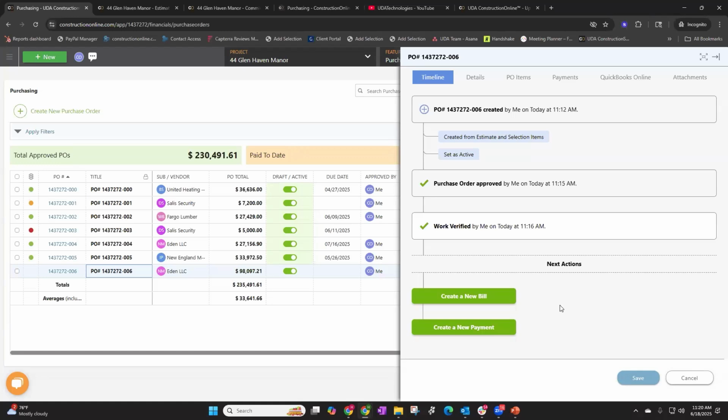When we think in the context of purchase order tracking in Construction Online, when you're submitting a purchase order, that's not necessarily the end of the story. We're also going to receive things like invoices from our subcontractors. We're going to receive bills that they need us to pay. So that bill feature is actually taking, hey, I've committed to spend this amount in the purchase order, but here is the amount that I am going to end up paying you. Like the example of that lower price. Maybe they got an even steeper discount and they discount that off of the bill, or they give me a loyalty discount. I can include that on the bill to see what I originally committed versus what I'm actually going to end up paying.